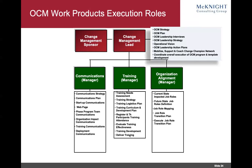The main thing is that these things get taken care of — that we do a communications plan, execute it, look at job roles and change them accordingly. As I'm sharing the tasks, it's going to come from these roles. Let's take a quick look at the change management lead: they're doing OCM strategy, the OCM plan, OCM leadership interviews, OCM leadership strategy and operational vision. They're mobilizing, supporting and coaching the change champion network — basically the network of people in the company that support the project — and coordinating the overall execution of the OCM program and all the development of the artifacts.